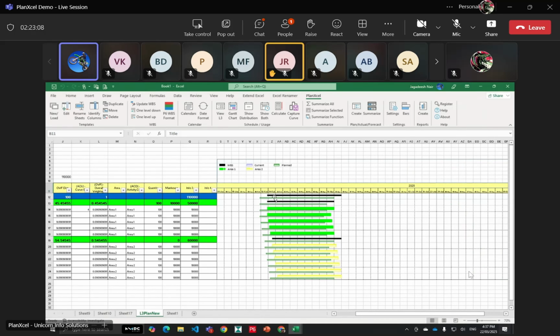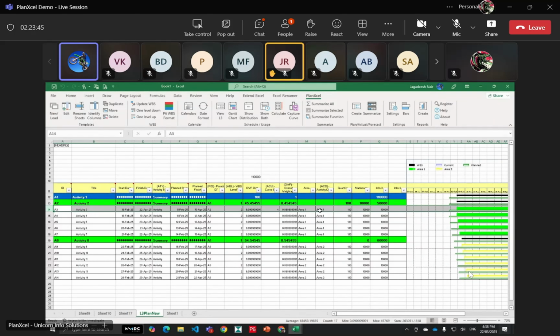Where in the same line you will be seeing multiple bars together. This particular feature will be helpful when you want to understand when you have the same types of activities running. For example, you have a villa project in which you have 10 or 15 villas to be built in a township. So there are the same types of activities, and you are going to use the same types of resources. Then the parallel activities have to be reduced. So how effective is your schedule? All this information we can show. I'll show you that as well. I hope this is clear.